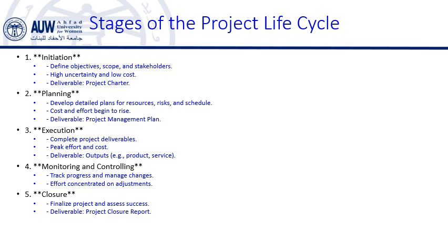For example, during the execution phase of a software project, the testers are conducting quality checks and managers are monitoring the progress. The project moves forward rapidly, especially if it's well planned. The fourth phase, which overlaps with the execution, is monitoring and controlling. The objective of this phase is that it runs concurrently with execution and ensures that the project is on track.